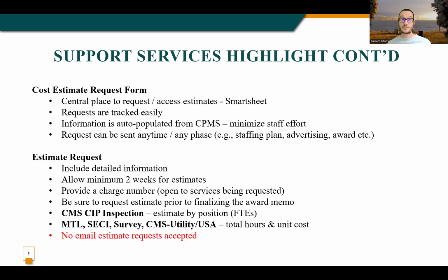And you can resubmit multiple requests for updated estimates as your scope gets more refined as you move through scoping and design. As I said, please include as much detailed information as possible. If you have plans and specs that you can send, that would be great. If you have a schedule of quantities or engineer's estimate, that would be great. Anything that we can use as a basis to build our own cost estimates for your project. The more information we have, the better our estimate will be.